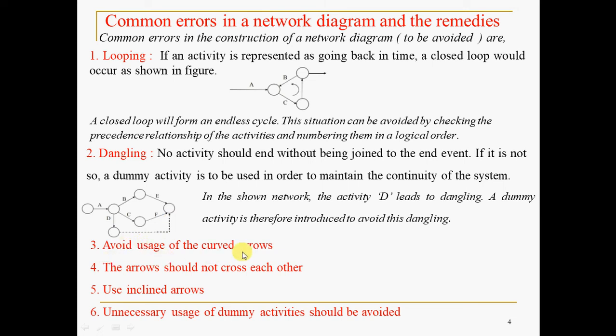Avoid usage of curved arrows. The arrows should not cross with each other. Use inclined arrows. Unnecessary uses of dummy activities should be avoided.